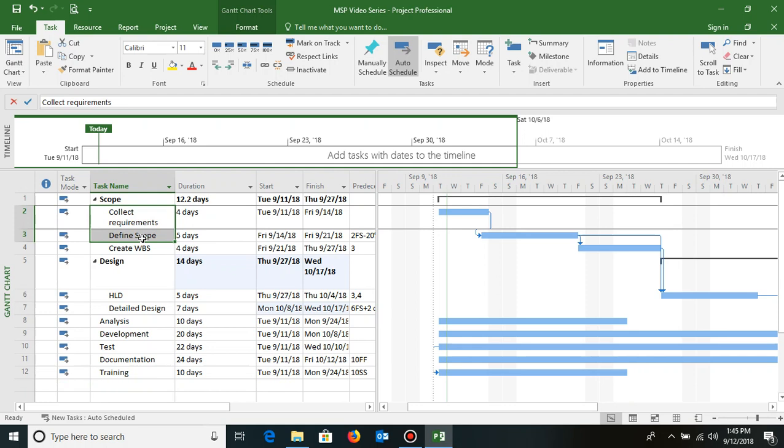Secondly, when you're typing a relationship, make sure you have the appropriate type of relationship between the activities, rather than just doing it on the basis of your whims and fancies. Understand the dependencies between the activities and the way it is possible to do those activities. Add those appropriate relationships. You cannot have two types of relationship between activities, like finish to start and also start to start. That will create an unrealistic schedule for you. So only one type of relationship can exist between predecessor and successor.